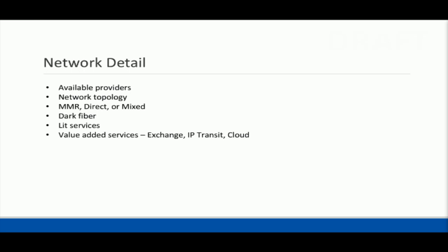When you're looking at a data center, you need to understand who the available providers are and what that topology is. Not just whether there is enough fiber along those legs, like I just talked about, but whether there are legs that are collapsed. Even if you buy a loop from a single network, or go to multiple networks, they may not be in separate alignments, so that there is one shovel that could come down and dig up everything.